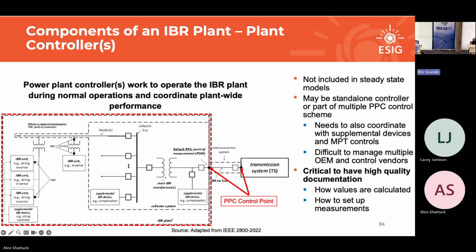So it's probably a lot cheaper from the developer standpoint to spend a little bit of time and model it in the EMT and figure it out before you're curtailed for 6 months. Because once stuff gets in the field, and once each of the vendors signs off their equipment to you, getting feedback and input is much more difficult. This is a really good use case of EMT: the ability to do this control interaction type of study before it hits the field.